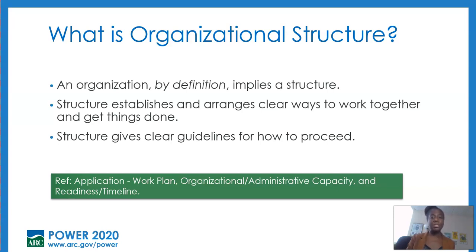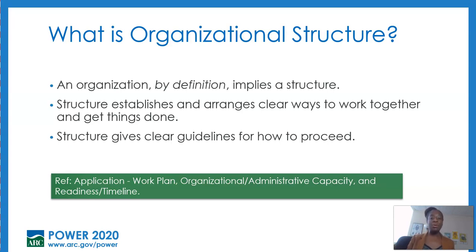Some key things to keep in mind as you're preparing your application in this particular section: you'll want to make sure that you are describing your organizational and administrative capacity to administer a Power project, as well as describing the readiness and the timeline by which you will execute on the key activities for your project scope of work. We recommend — and it is required — that you have a work plan that clearly outlines all of the key activities, the responsible persons, and the time by which that particular activity will be completed.